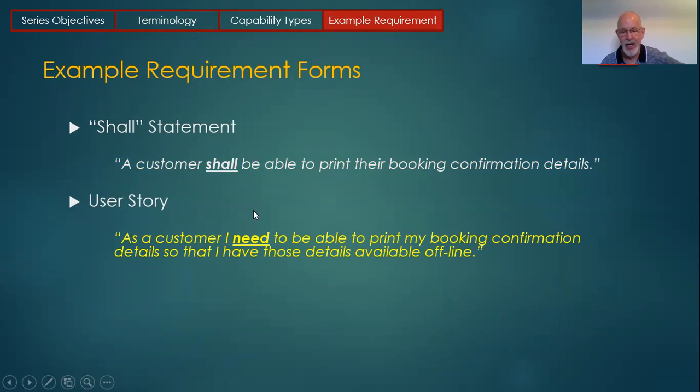So a user backlog has a set of stories. Each one says how valuable it is. With our friend, the classic waterfall, and a whole bunch of shall statements, the value of delivering that solution comes from the business case. So every requirement in scope is supporting that value. So we don't have to individually rate these things of higher or lower value. We do give them a priority. We say we want this more than we want the other, but we don't have to make up some value.